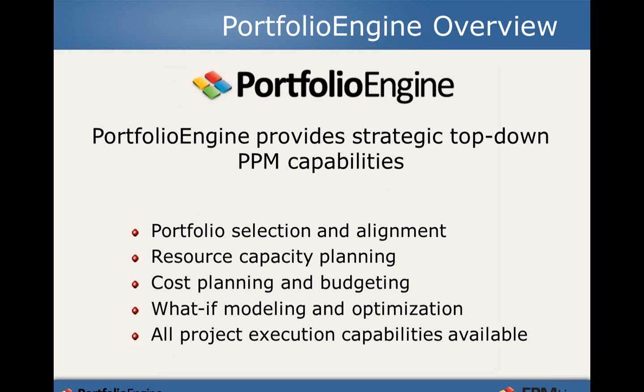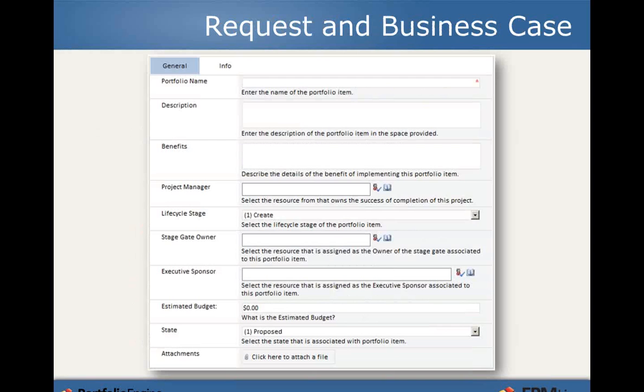It really all starts with getting portfolio items in the solution. And in the front, you're probably going to want to put a request in and get this on the radar. You're going to want to request a project, for example, and capture all the attributes and the business case information you might want to evaluate as part of this potential project. So things like the names and the description of the project, the benefits you hope to derive from the project, other things like what you think it's going to cost, etc., as well as other relevant information on where things are at in your life cycle and who the owners are going to be and who's going to manage this and who's going to sponsor the project, and attachment of any documents that you might want around that.